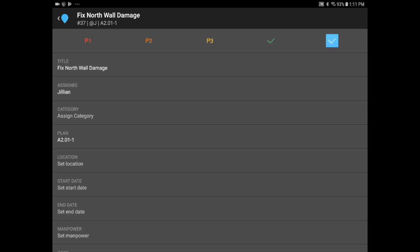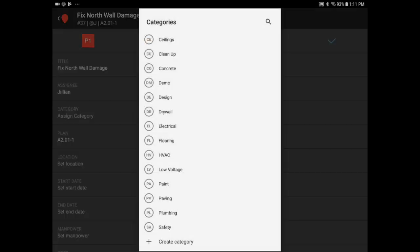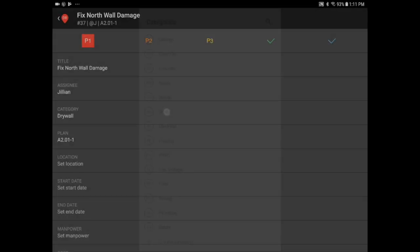Remember that only admins can verify that a task has been completed, so you know that tasks are being completed correctly and you are able to avoid rework or delays. I can edit the title, assignee, and add a category. Let's put drywall.